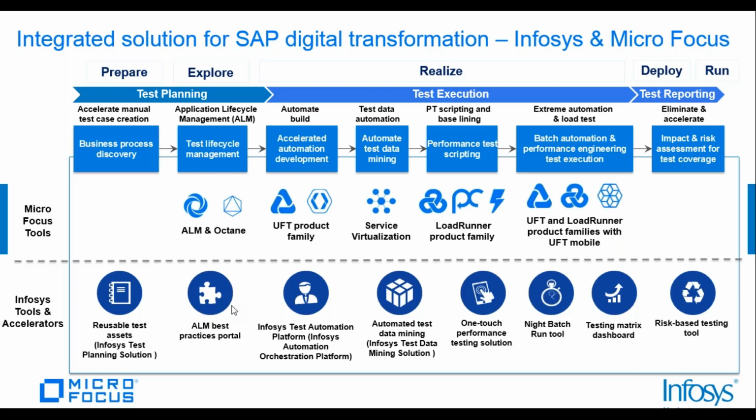So this has helped one of our customers in the US, where we were struggling with how to achieve 2,000 test cases to be completed in a 7 days time frame. Earlier, it used to take almost 2 weeks to complete a regression script for 2,000 test cases. And we created this utility and started running in batches as well, also using the machine in the off hours when people were not working.